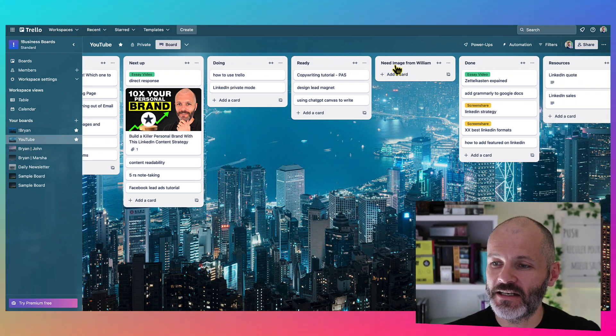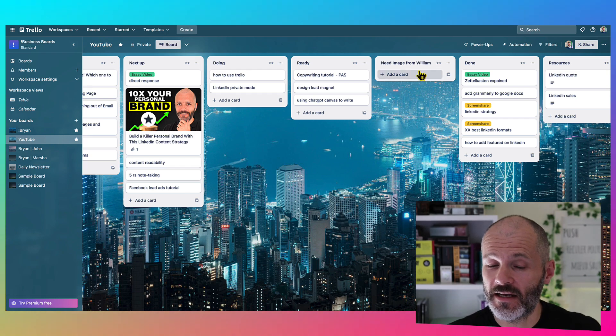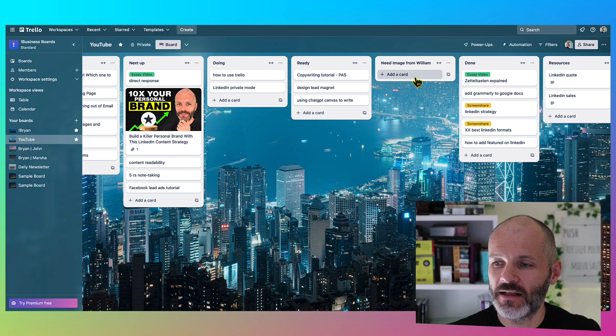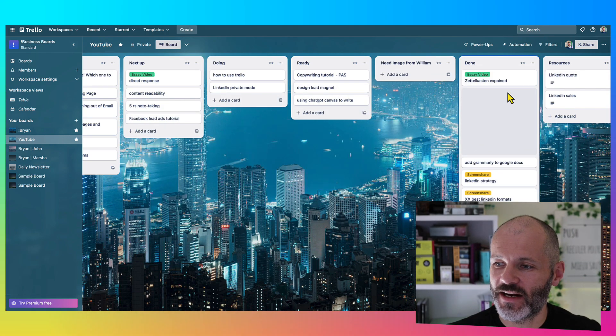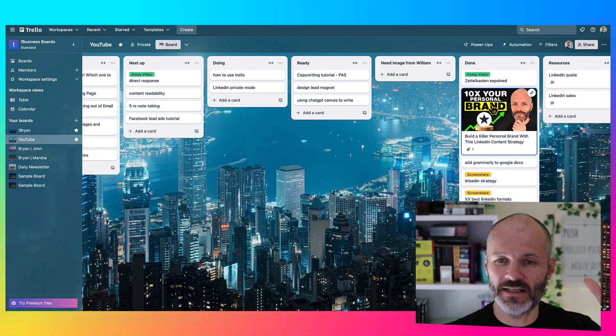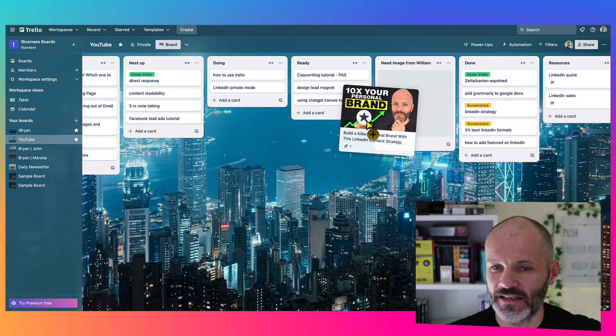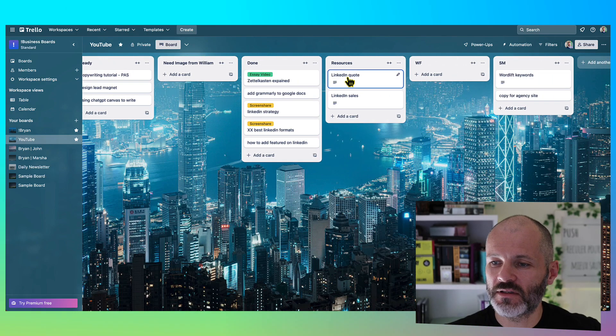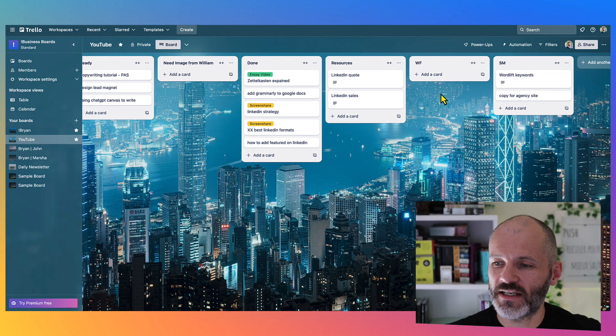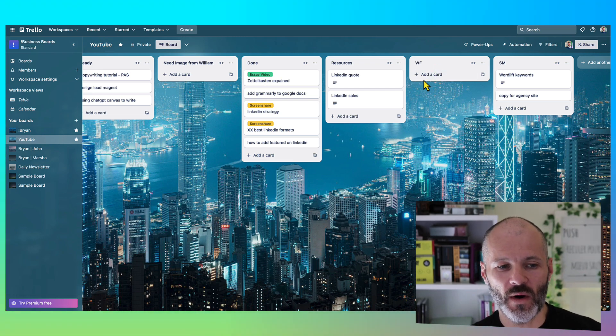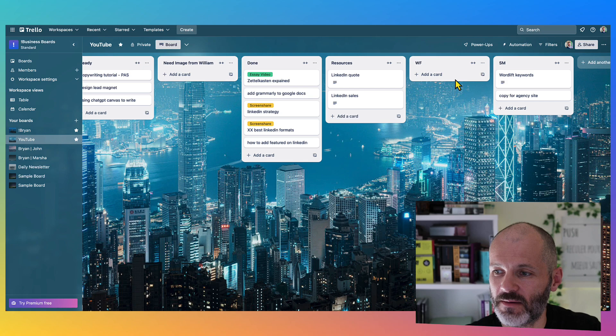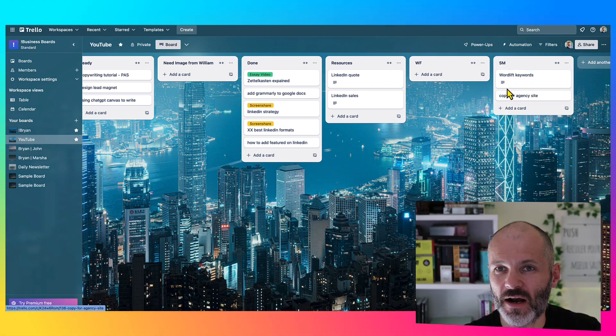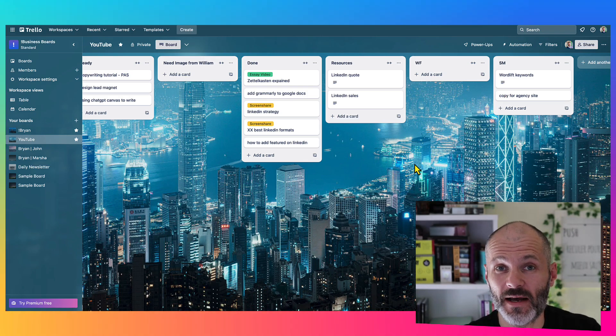And you'll see that I've added an additional column, Need Image from William. So William is the thumbnail designer, and the team member will tag William if the video needs a thumbnail. And then once it's done, so you can see here, here's one that has a thumbnail, I'll drag it over to Done, and that means it's ready to go up onto YouTube. And then I'll add it to YouTube, or a team member will add it to YouTube. I also added some additional columns, so Resources, so there are things that I want to reference for this project. Waiting for, so sometimes perhaps I'm waiting to finish a video because a third party needs to get back to me about something. And then someday maybe, which are video ideas that I may record, but I'm not quite convinced they're worth the time at the moment.